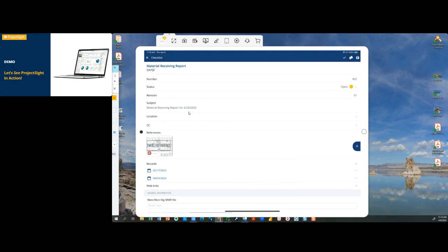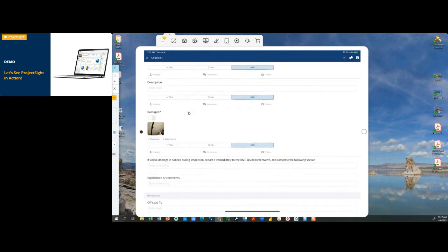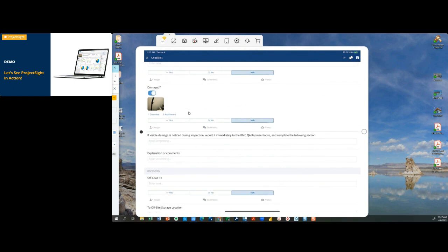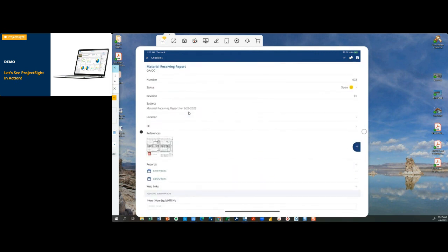So you're able to create a change order or an overtime approval ticket within a checklist, within the ProjectSight module, on the iPad, on the phone, and you're able to grab a wet signature from the GC, from whoever, document the work that's being completed, document how many man hours that's taken. That way you can have that as a record. I used to argue tickets all the time, tickets that didn't go completed.